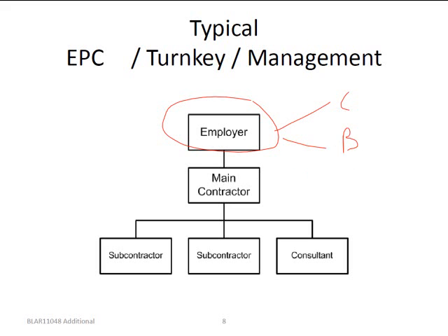The main contractor in this case takes all of the responsibility. Right, you can see all of the responsibility below this line becomes the main contractor's. So all the subcontractors, all the consultants that are going to work on this project report directly into the main contractor. The main contractor has a single contract over there. Alright, so there's our single contract with the employer. The subcontractors do not have any access to the employer from a contractual point of view. Alright, so keep that in mind.